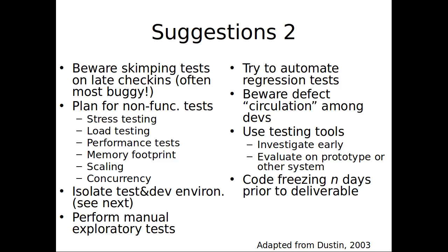Try to do a code freeze several days before shipping. Why would you do that? Prior to the deliverable, 4 days, 3 days before, for testing. Why freeze the code? So there is adequate time to go through testing and quality assurance. Yeah, exactly. Because without that, realistically, you're probably not going to have time to test it well. Or if you do test it, you're not going to have time to fix the issues that come up.